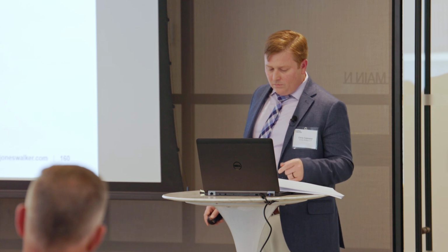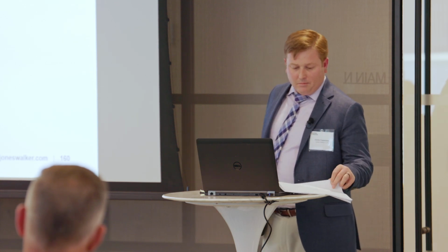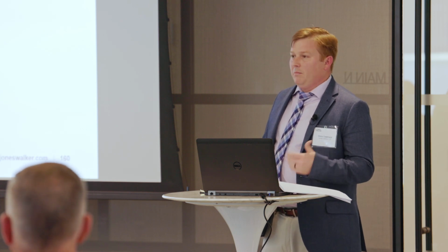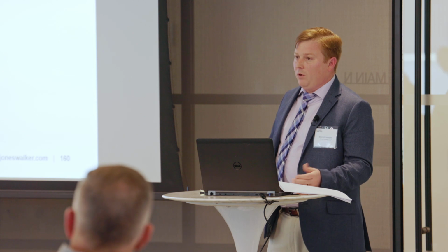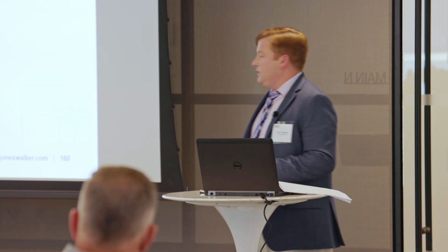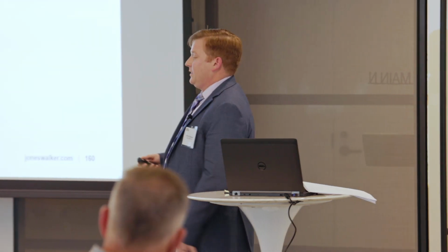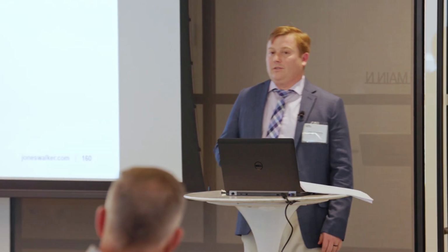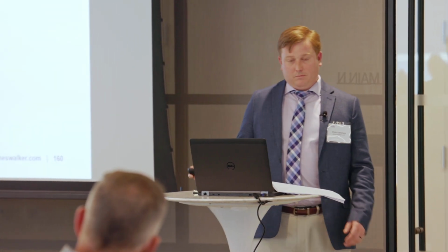Notice, so Marine Industries, same case, under FAR and other clauses that I'll skip to in a minute, the contractor must provide notice before the area is disturbed, and it must do so promptly. Well, here, Marine Industries took 46 days from first encountering the condition to reporting the condition. And the court said that, standing alone, was fatal to their different site condition claim.